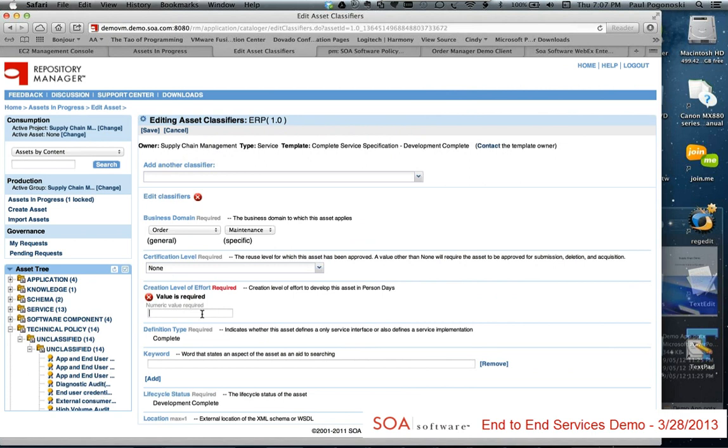So what this organisation is saying here is that, well, you said it was going to cost $20,000 to build when you made an estimate of this. What did it actually cost? So they're tracking return on investment, ROI on services. So they're looking at actual cost of services to try to A, improve their estimation model, but B, work out how much a service did cost, aggregated services do cost, so they can charge for those services, their consumers going forward